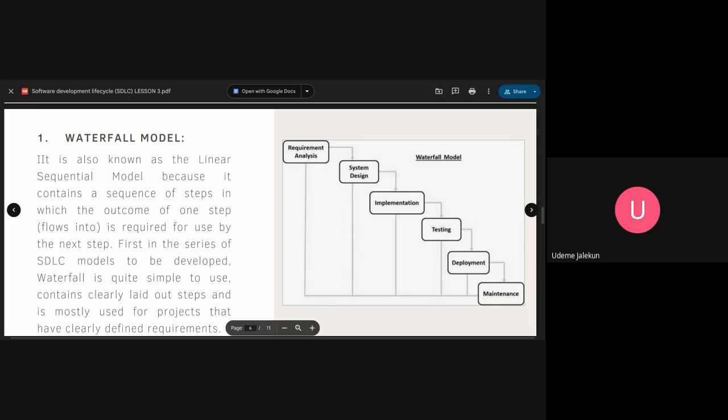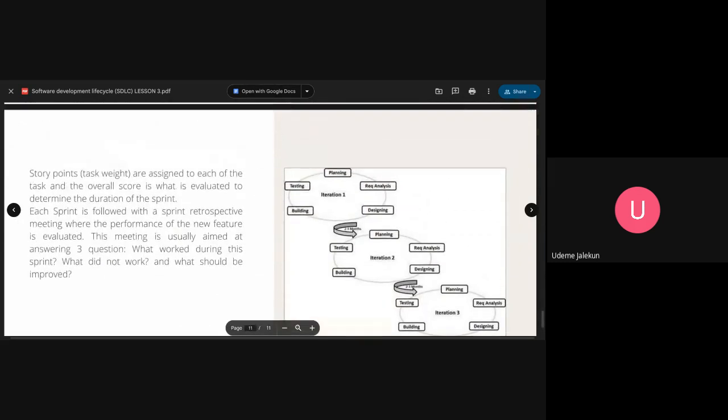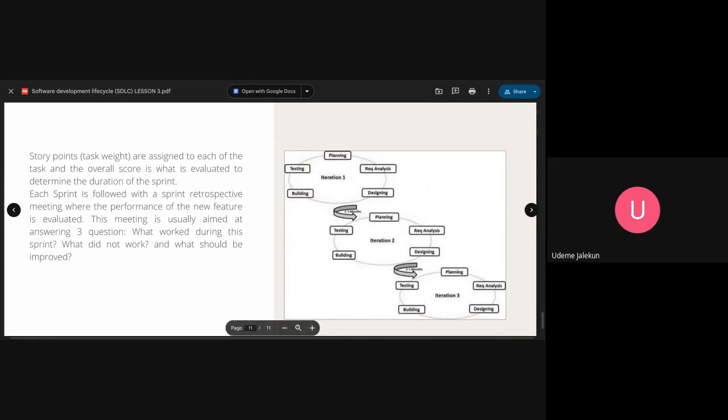Esther can only announce that product after month 10, based on the calculation we did. But if you use agile, it means Esther can just speak with her team. Okay, what are the essential things a user needs to have now? They'll say the user should be able to sign up, log in, and view profiles of available nannies. So Esther says, okay, let's do those 3 features first. The remaining 2 features will be iterated on and pushed as updates after we have launched.